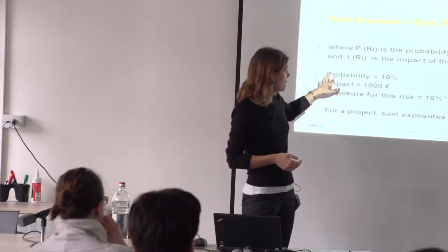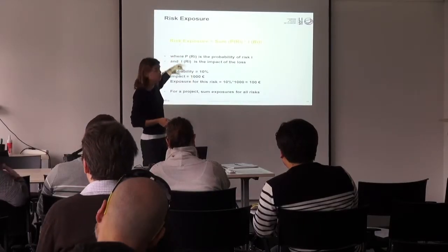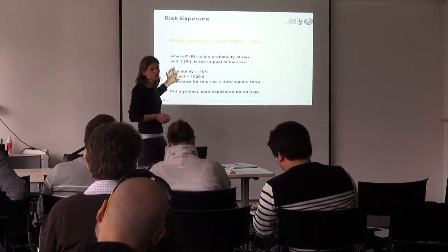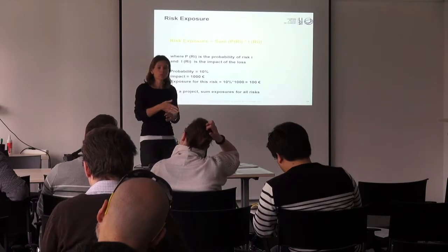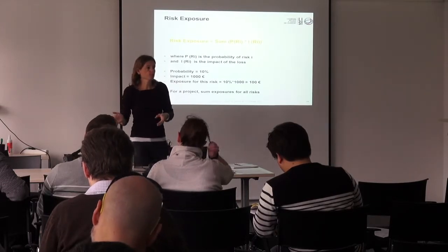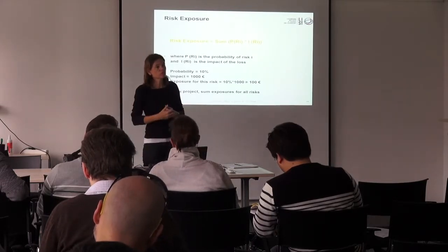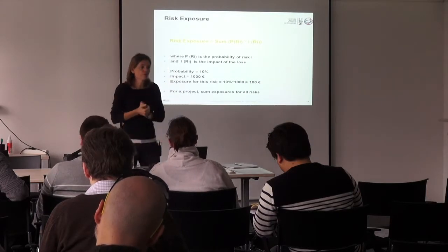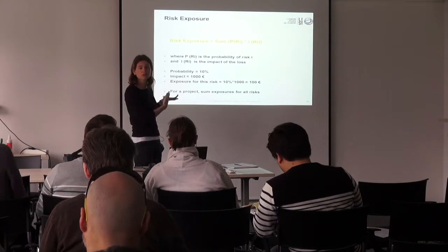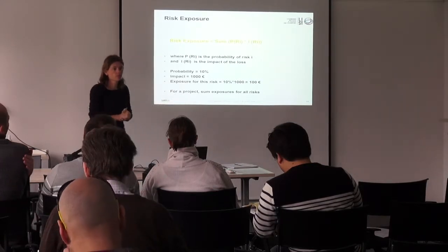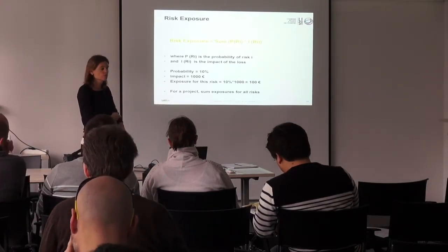So most of the time you don't compute that, and you stick to whether that risk has a high, medium, or low probability, or something like that. We'll see later on a more practical way of implementing that. There we are still at defining and giving you some standard definitions of risk management.